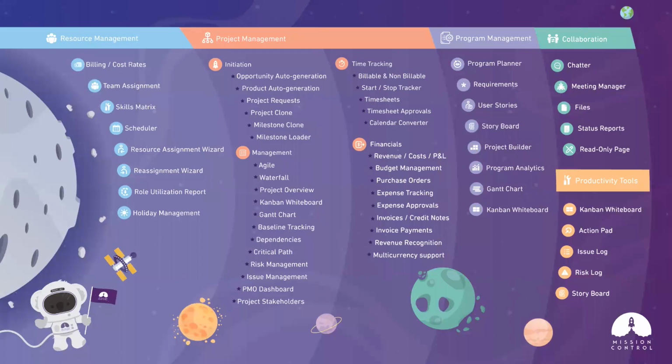You get a calendar view of all of your resources in one screen, and you can see from 1 day all the way up to 52 weeks, plus all the work that's been assigned to them. And most importantly, see if they're over allocated. If they are, you can move work directly around from there.